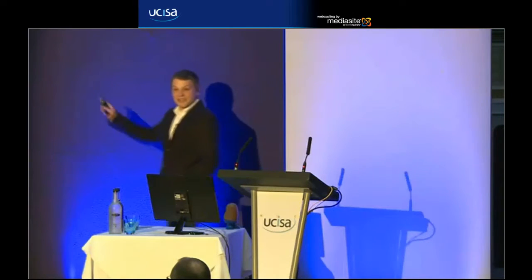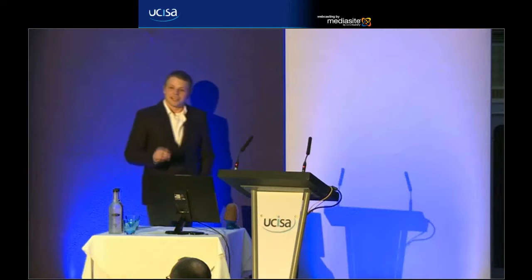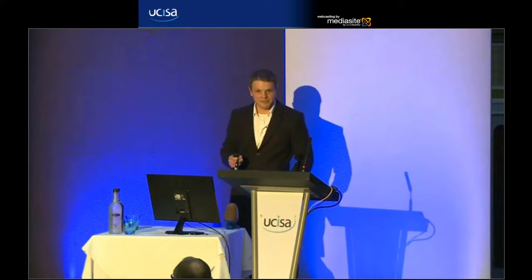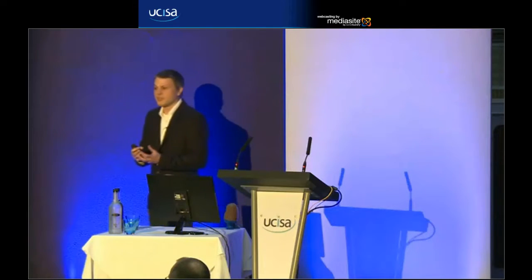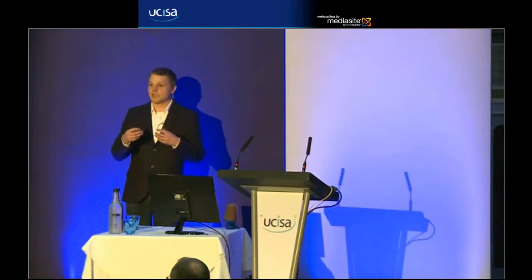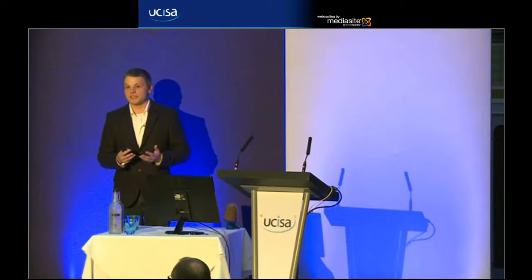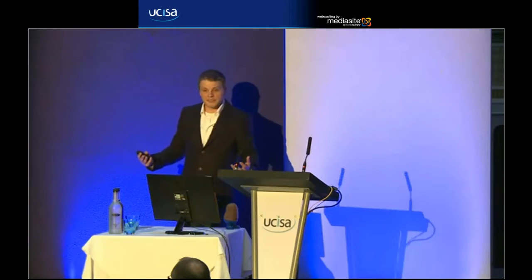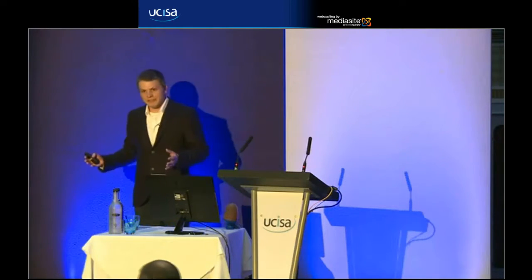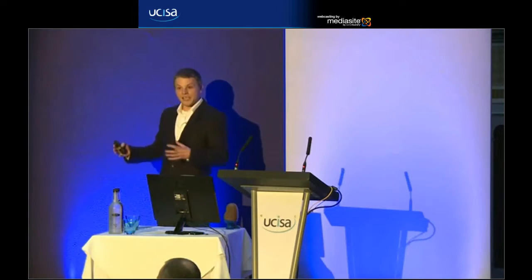The answer is 35. It's 37, actually, 35 to 55. What I'm trying to illustrate here is the smaller something is, the easier it is to estimate, because you can see the whole thing at once. So if I've got to create a web page, I can probably tell you I can do it in an hour. The bigger and more complicated something becomes, the more difficult the estimation is, and the less accurate your estimate is likely to be.